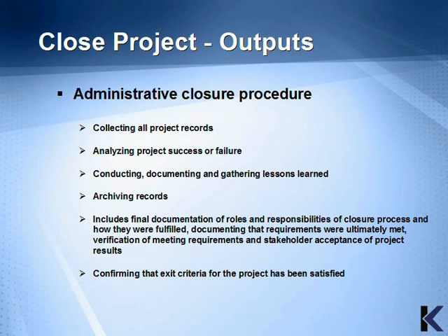It also includes archiving records and includes final documentation of roles and responsibilities of closure process and how they were fulfilled. It also includes documenting that requirements were ultimately met, verification of meeting requirements, and the stakeholders' acceptance of project results. It also confirms that exit criteria for the project has been satisfied.